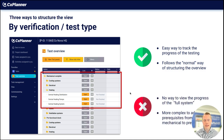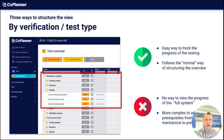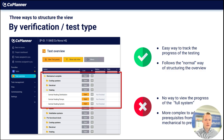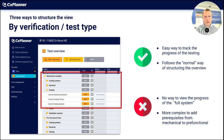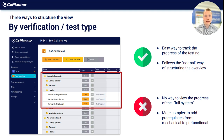The drawback is that there is no way to view the progress of a full system in one place. For example, the heating system may have checks under mechanical complete, pre-functional check, and system integration — so you cannot get a full overview of the heating system without going through each area separately. It can also be more complex to manage prerequisites and bindings across areas. Finding the central heating distribution across mechanical complete and pre-functional requires cross-area binding, which is possible but increases the complexity of the view.